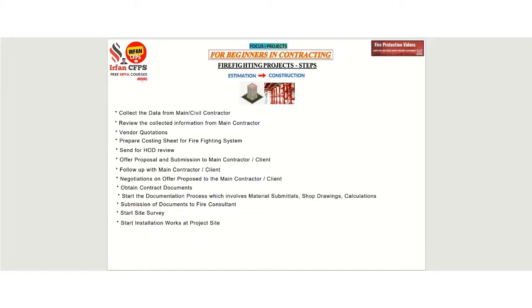Upon approvals, we can start the site and installation can proceed as per the shop drawings. The last step is the fourteenth step: finally, upon execution of the works and installing all the equipment at site, we need to do the final testing and commissioning as per NFPA requirements. This has to be done in the presence of the fire consultant and the client, and finally we need to hand over the project.